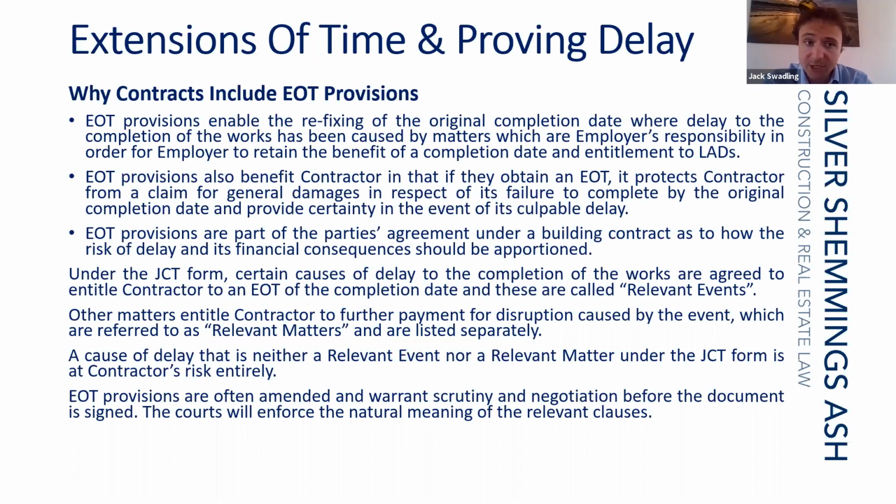Second, extension of time provisions can be said to benefit the contractor in that, if they obtain an extension of time, it would protect the contractor from a claim in general damages in respect of its failure to complete by the original completion date, and provide certainty in the event of inexcusable delay.